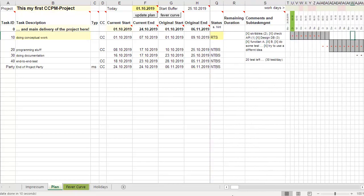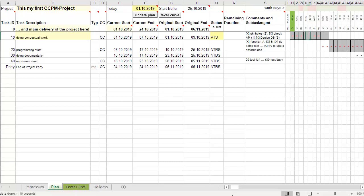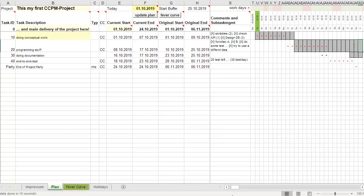In the Gantt diagram, you see the six days: one, two, three, four, five, six. And the dots here show the critical chain plan. That means out of the six days, it's four days in the real plan: one, two, three, four. That's all. This is done with all the work packages.